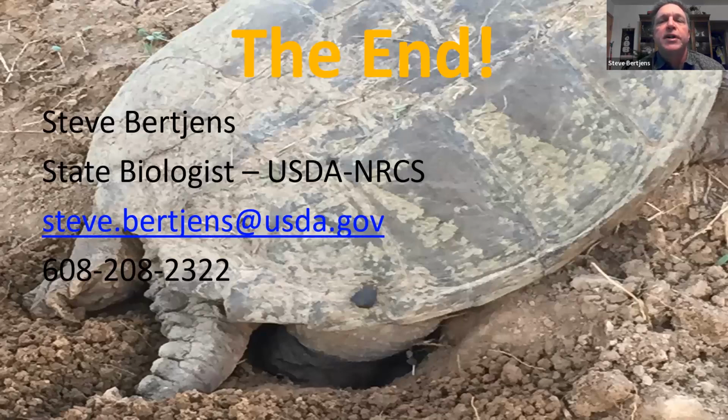Because what the engineers told me is, when they're putting together that design, and now the other thing that these standards updates are going to force us to do is, on all these projects, we're going to have to do what they call a fluvial geomorphology study, especially on the sites where there's going to be more rock. So a lot goes into that stream classification process and documenting all the structures. They're a lot less willing to modify that design plan, because it's based on all of that fluvial geomorphology. That's why I think the walkovers are important to get everybody, because as long as it's on the design plan, it's a go.